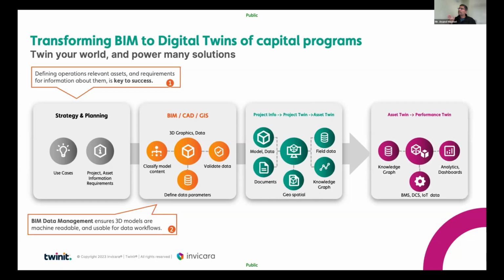And then ultimately, at the point of handover of an asset, the project twin continuously matures, because the information you're going to get will progressively mature. At the point of handover, and managing handover is itself a process, itself a digital twin application, you can do digital witnessing, ensuring the commissioning management is done well and the data you need for operations is properly captured. And that results in an asset twin, which you hand over into operations.